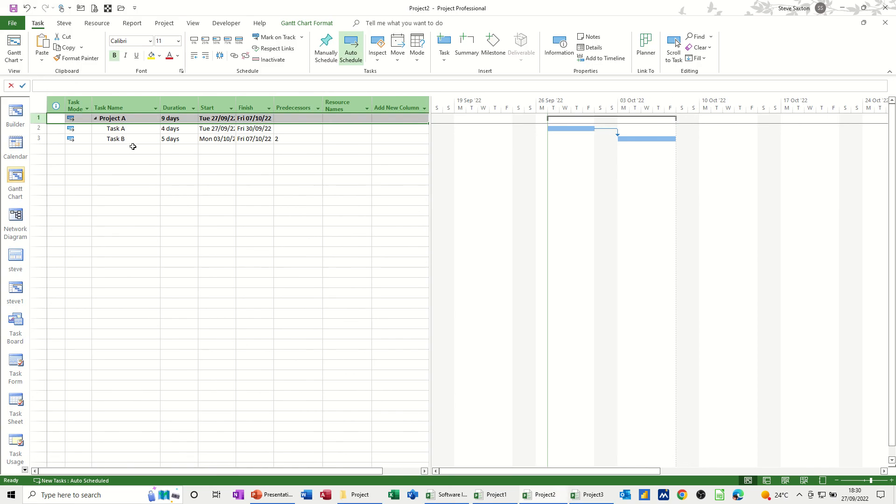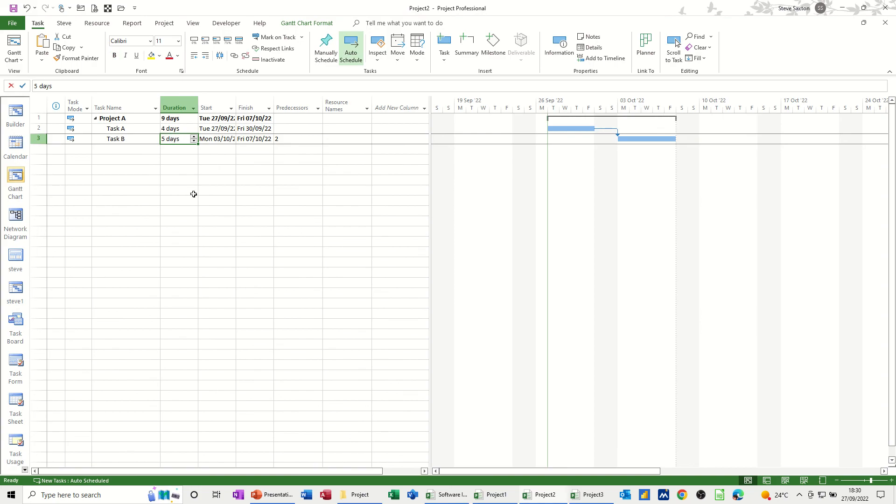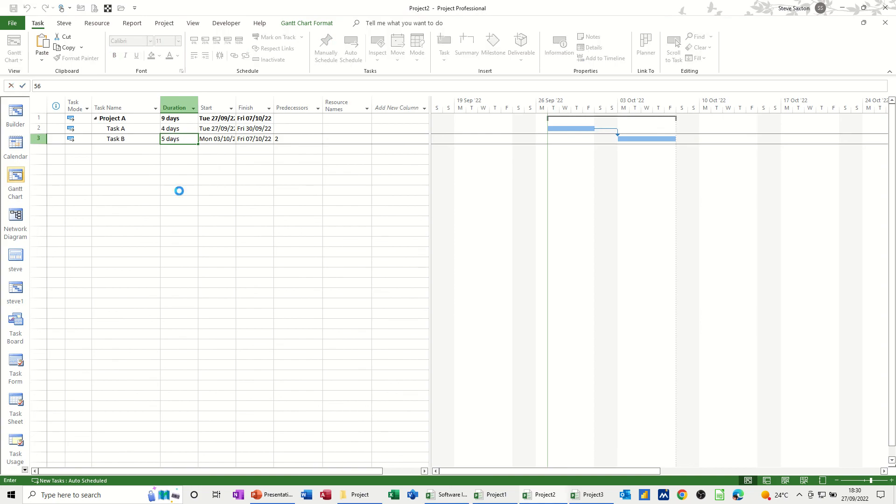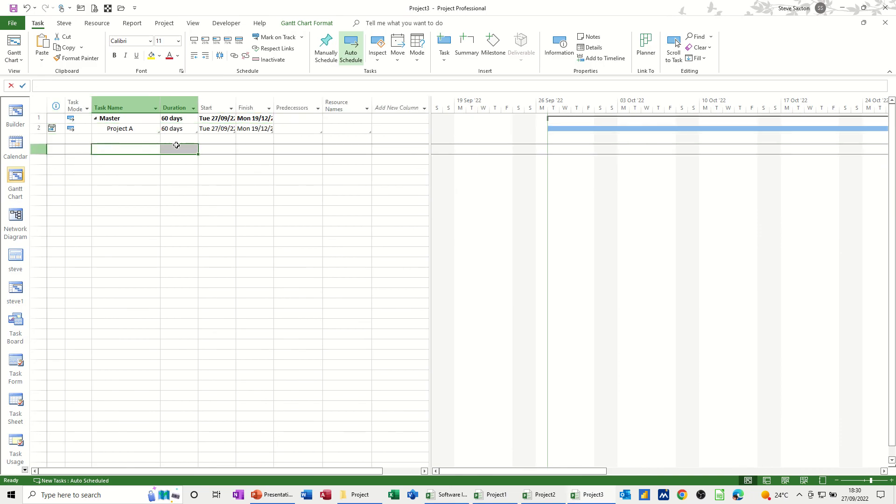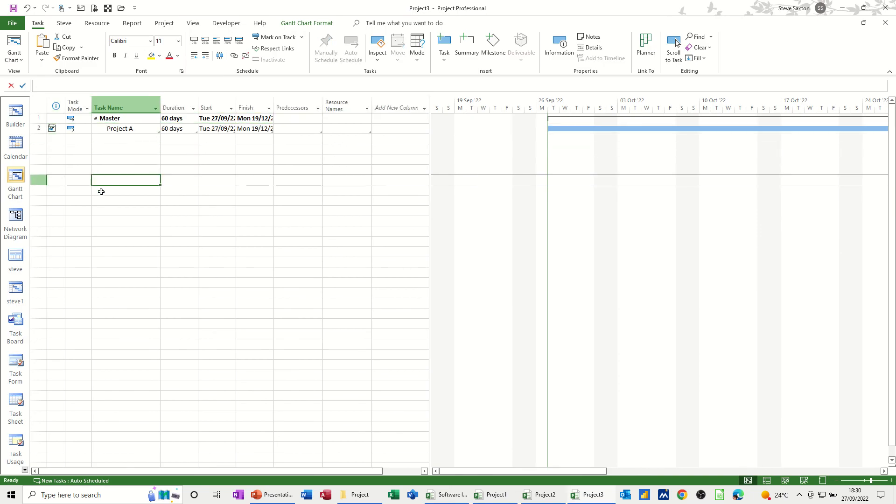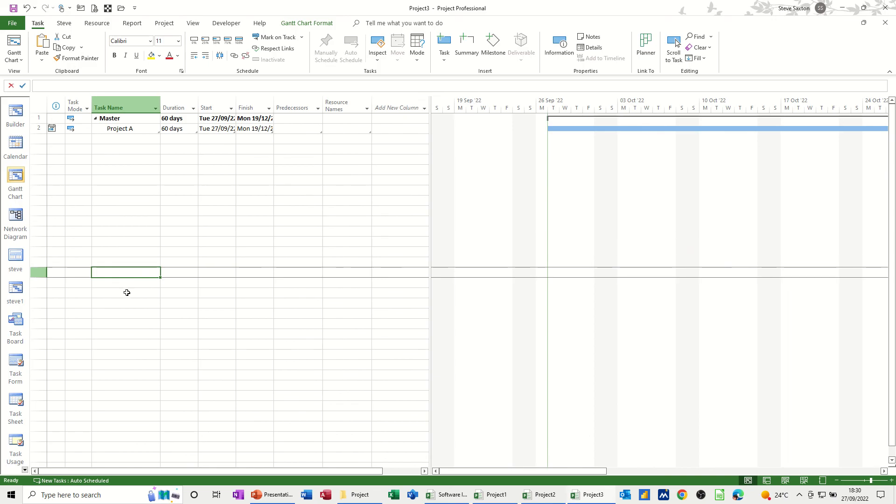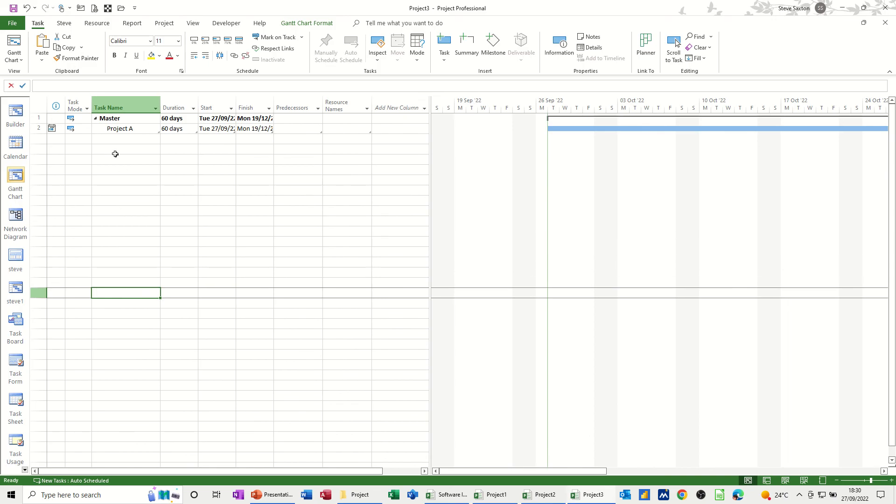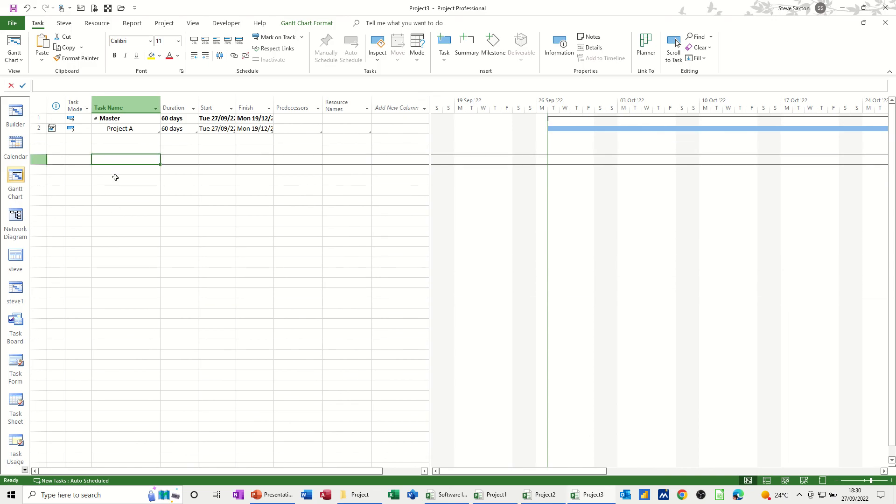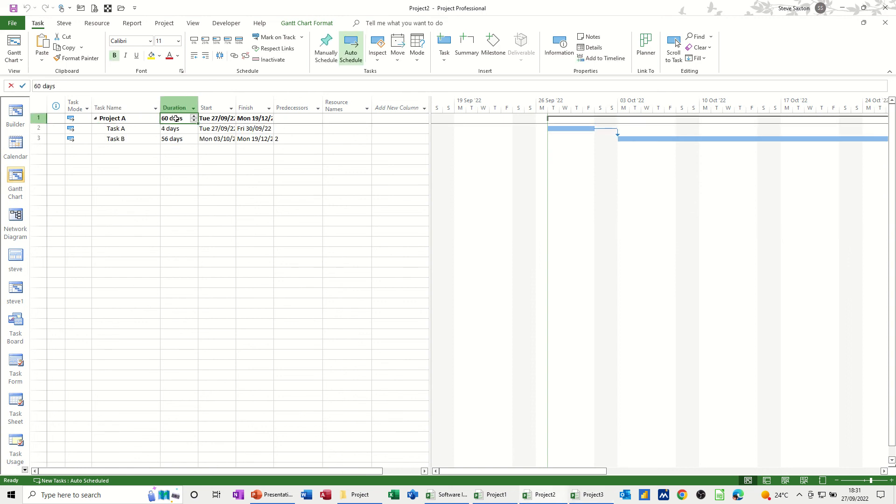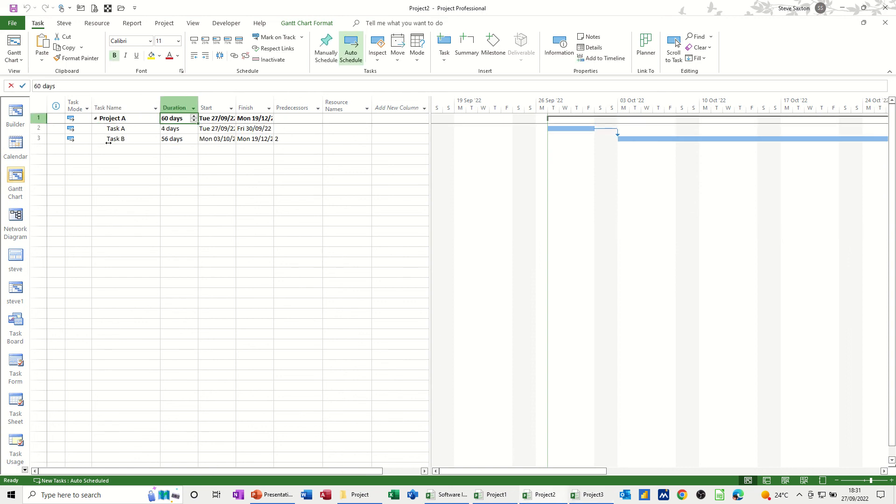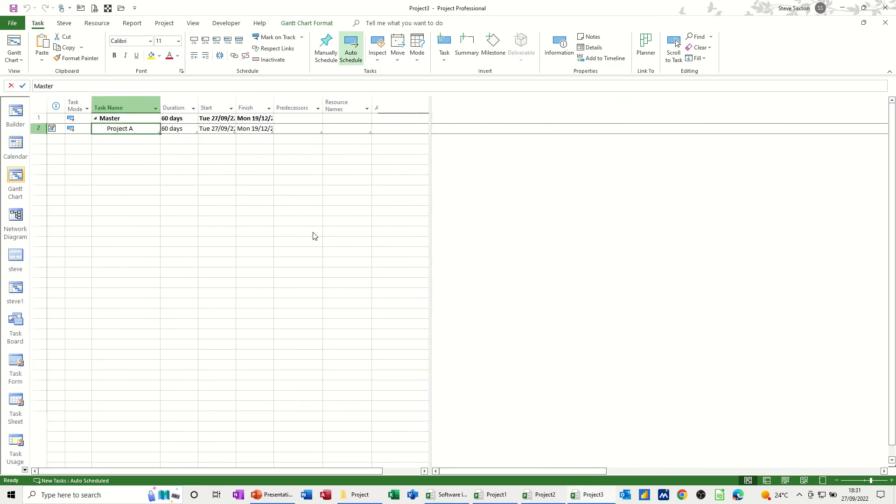Put some different durations in, 56, so that's gone to 60 days. Come back and your timeline's picked that up, 60 days. So you could bring multiple timelines in, headline information from a big project, or lots of headline information from lots of different projects. If you've got both files open and you double click on project A in this master file, it just goes into the actual project A file.